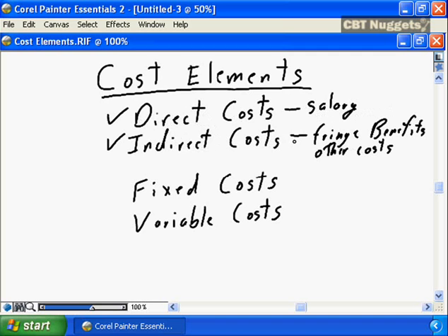What about the time for the purchasing agent to go out and negotiate a deal? What about the transportation costs to receive the material? What about the storage costs and the receiving costs to receive the material into your organization and potentially store it for a period of time until it's used by your project?